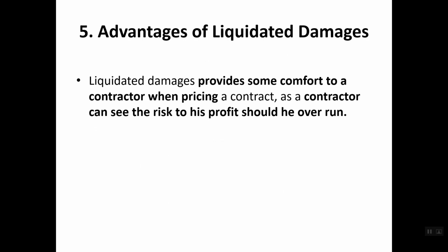One of the advantages, as we have discussed, is that it gives a comfortable environment to the contractor at the bidding stage when he is doing pricing. He can identify that risk, address it, and do some mitigation to reduce, minimize, or make it zero, and make sure that his profit stays with him.